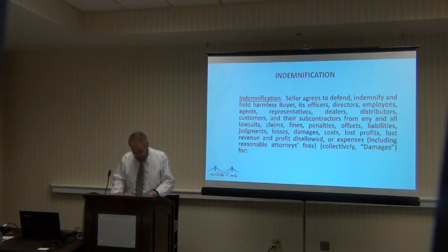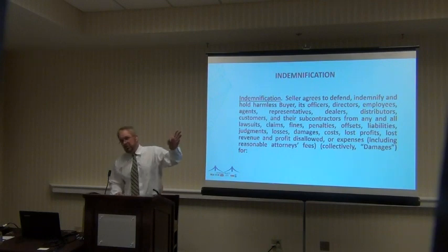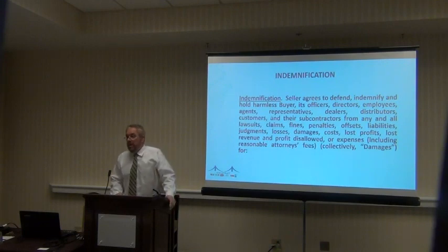Anytime you see the phrase any or all at the end of it, it's kind of a red flag. Sure. Defend. Although most folks' insurance, whether it says defend or not, will provide, if on additional insured status, I mean, we're talking an additional insured claim here, will provide a defense anyway, correct? Absolutely. But if you can get indemnify and hold harmless as the only undertakings, you know the saying, sometimes less is more. It's less is more here.